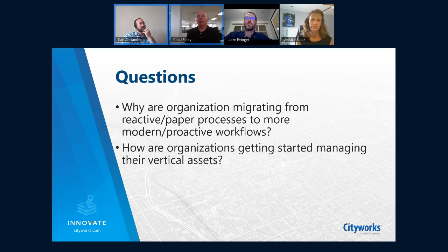Yeah, we got a free trial license, 30-day or 60-day trial, for ArcGIS Indoors, and we took our train station that was recently built that had some nice CAD drawings, converted that into GIS, and then pulled it into Cityworks, and just started showing people that, hey, this is possible. That got the buy-in, and we were able to negotiate a good deal on the Indoors product. And then we did that.